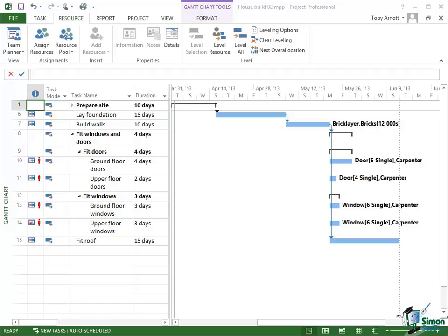But it is very important always to bear the simple solutions in mind. It may well be that manually rescheduling 1 or 2 tasks or just getting some extra resource for a period of time can solve a scheduling problem. And rather than make the scheduling extremely complex and trying to make a schedule fit when it's just destined not to, just getting a little bit of extra resource or perhaps looking for the simple solution is very often the best way of solving scheduling issues.